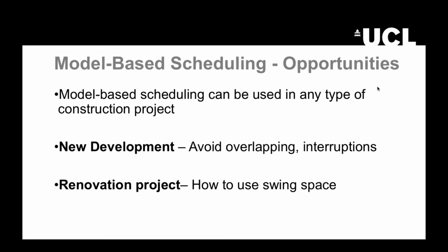For example, in a construction project, the project teams can use the 4D model to manage the construction schedule, avoiding overlapping or interruptions between different teams and activities, and also matching the timeline with the location-based schedule, communicating the short-term objectives to the different teams, to the different stakeholders, and evaluating the daily progress. I mean, it provides very good opportunities for tracking the progress in the project.